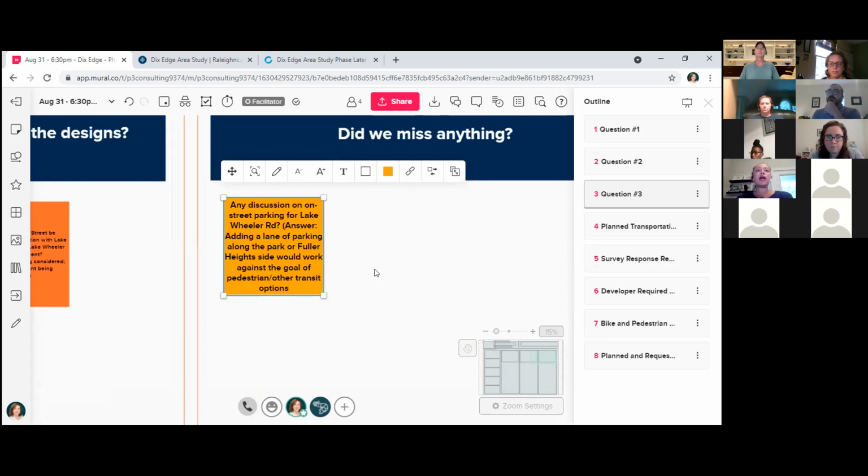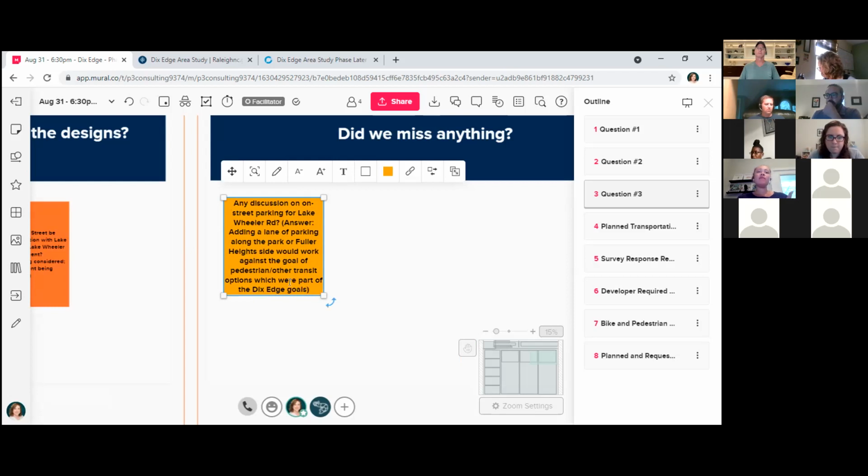Matt, I'll also just add in that while we're taking space, the right of way, our goal is to take right of way space from the park side. We are also working with power lines, that large power lines and transmission lines that need to be moved. Finding the space for parking would likely detract from the bicycle and ped space. So that was a trade-off that we looked at and ultimately made the decision to prioritize bike and peds, as Matt had mentioned.